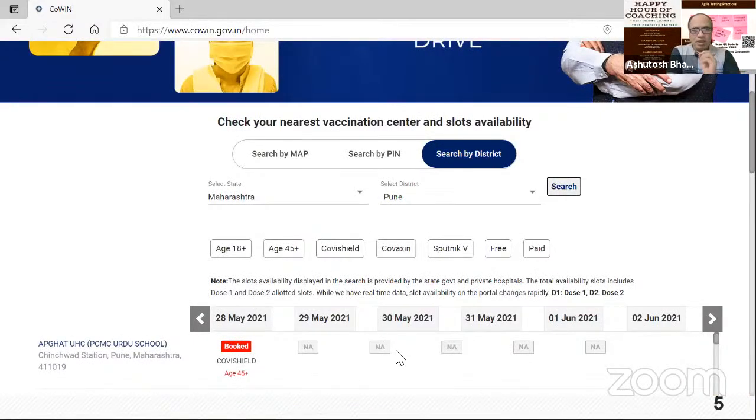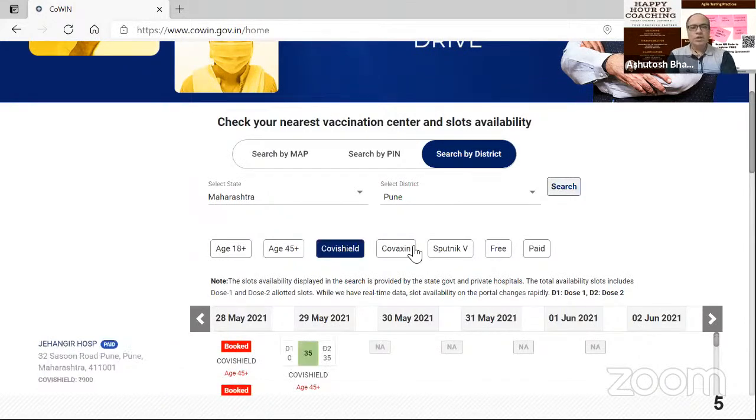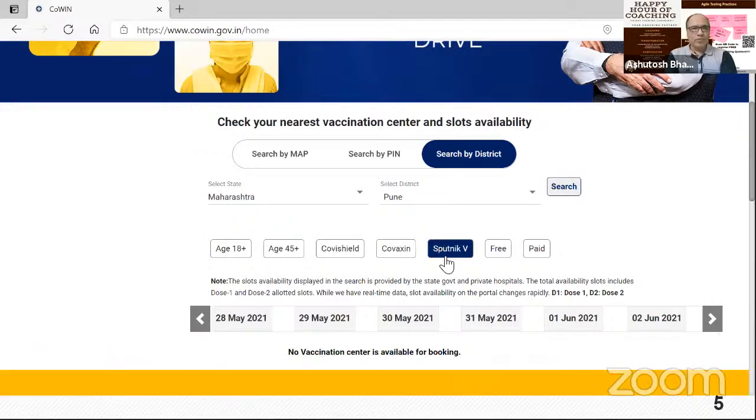Now, if I go by a risk-based testing strategy, I will test the Covishield combination first, then Covaxin. And if time permits, I will go for Sputnik. The reason being, as a business scenario today, hardly any center is delivering Sputnik. So the people hitting that particular option will be comparatively fewer.